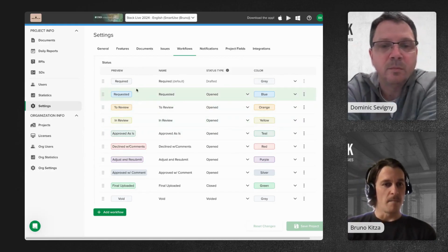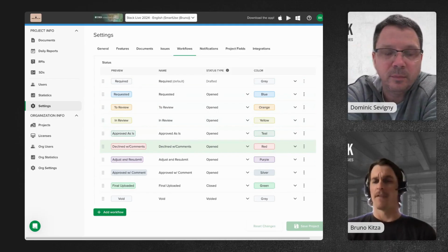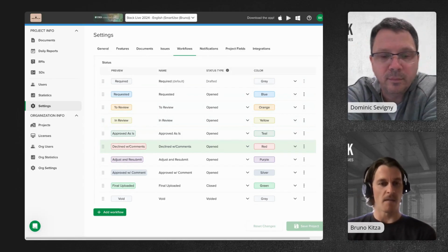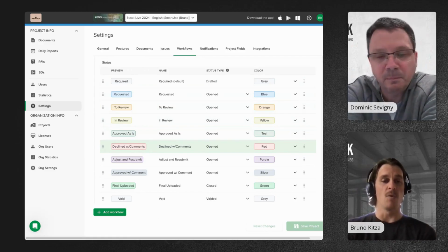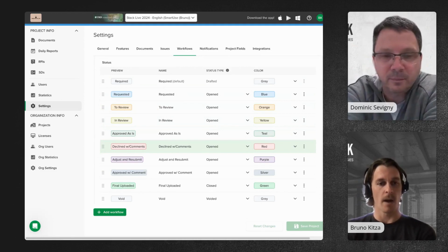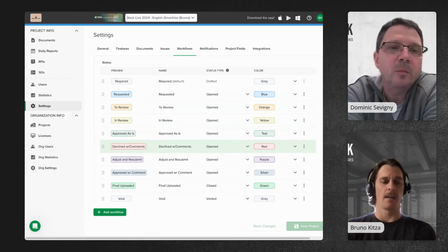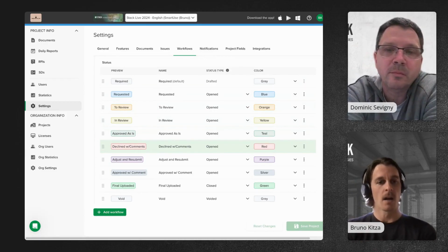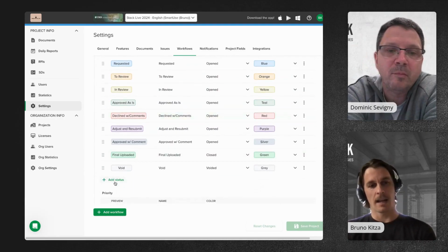And what I'm noticing in our example, let's say I want to have an on hold status. My professional during the approval process of a shop drawing may take some vacation, maybe out of office. We have a situation where we know that we will not have any movement within a shop drawings request until a given date. I want to be able to put it on hold, so it's out of my head. I know that I don't have any actions required until a given date. So if I keep scrolling down here, I can add a status.